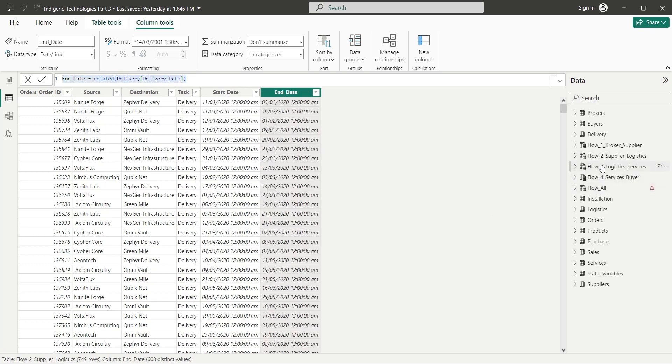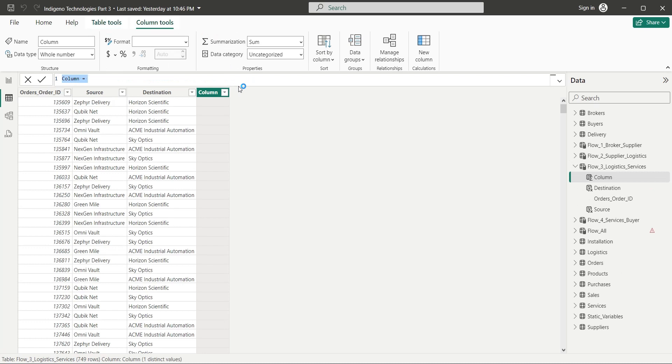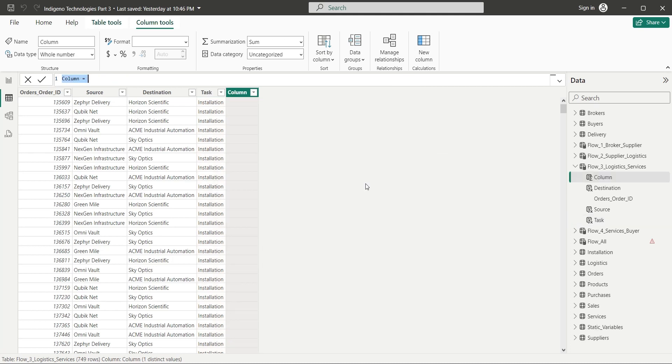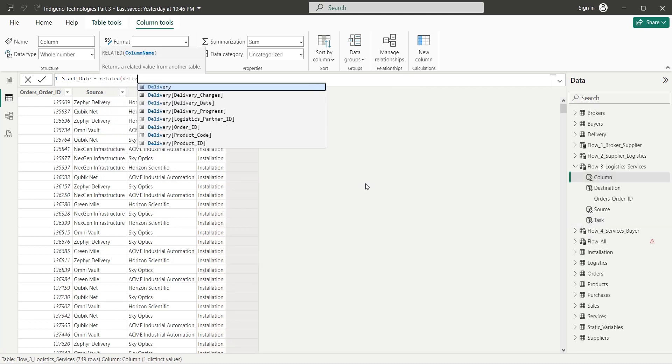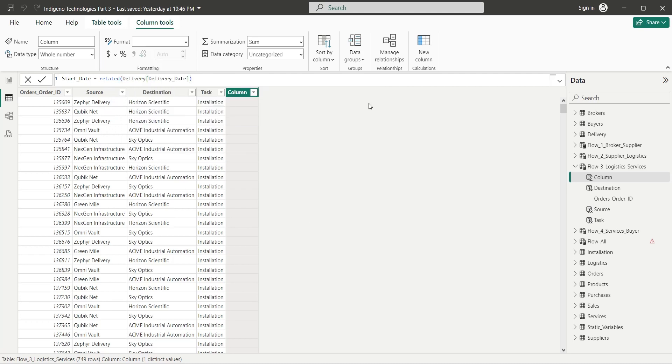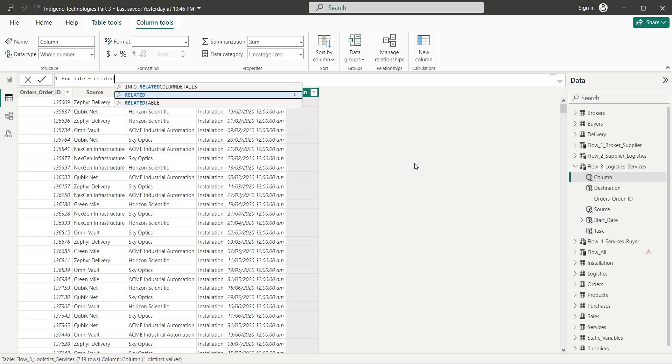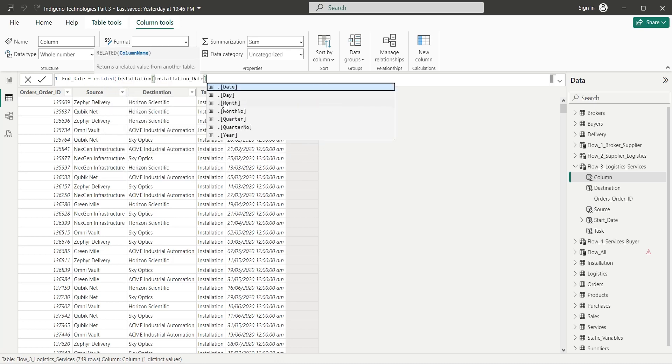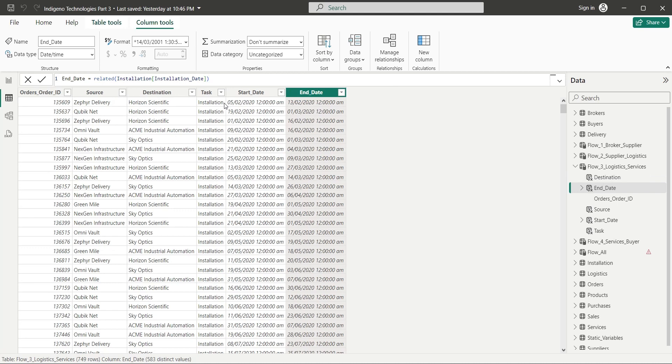In the next table, we will again add a task column. Here the task is installation. The installation process can only start when the product is delivered. Therefore, the delivery date will become the start date of this task. The task will end with the installation or setting up of the product. Therefore, the end date will be the installation date from the installation table.